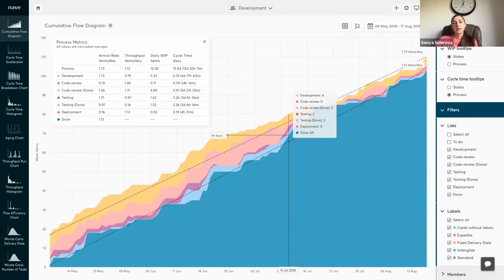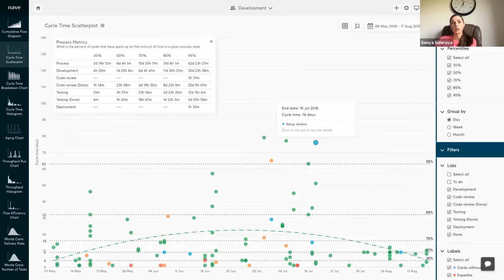To maintain a stable system, strive to keep your WIP as consistent as possible. If the WIP is consistent, arrival rate and departure rate lines will grow in sync, and the distance between them will stay equal. It is important to say that the data displayed on a CFD depicts only what has happened for a given process, and it shouldn't be used for any type of future prediction.